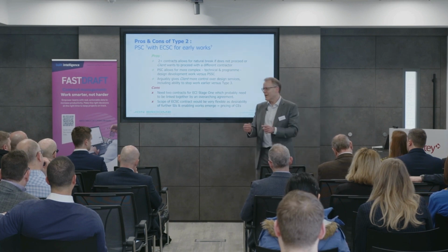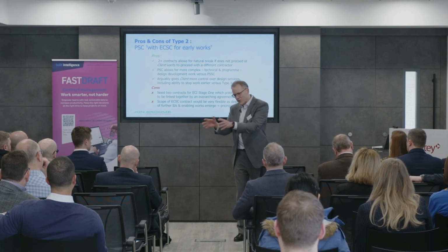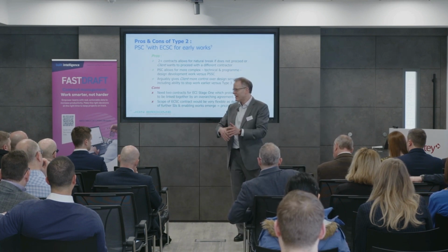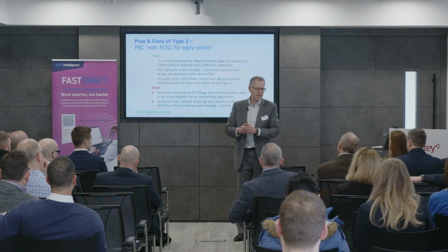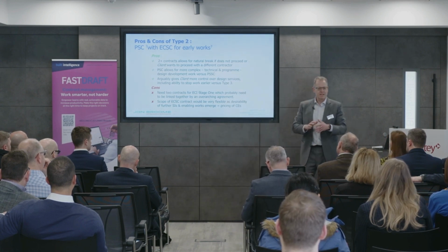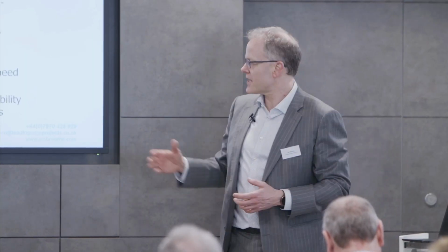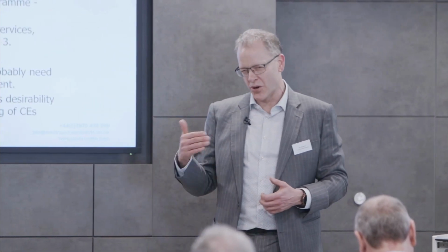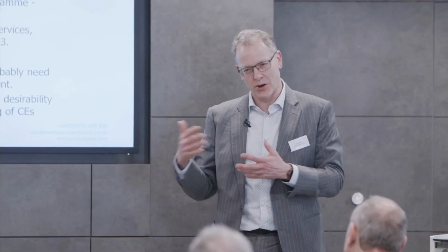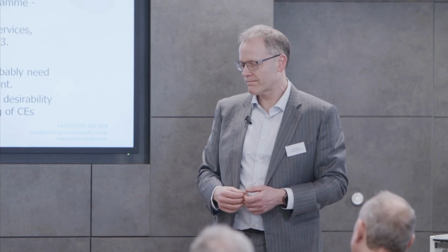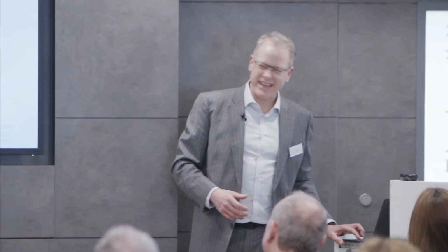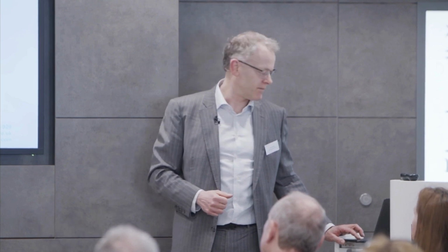Oh, actually, we've looked at the programme and some enabling works there would be good and advisable. You've got to add them on as compensation events, which you hadn't anticipated. You might even be hoping there's no work in there, or very little. So that's got to be quite flexible. And is the short contract designed for flexibility? Well, not really. It's simple works. So limited physical works in stage 1, shall we say.